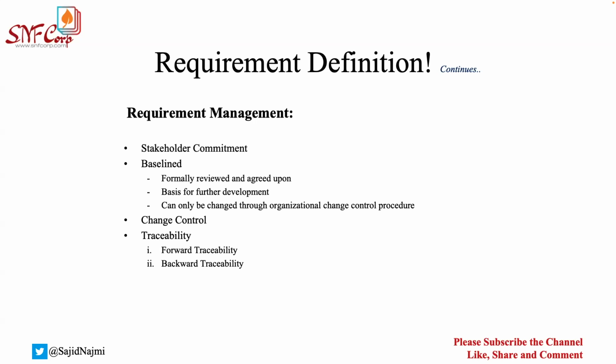So traceability metrics is something a BA creates and uses as their own working sheet. A very important thing to remember: trace metrics is not required by the project. You don't have to upload this trace metrics to the functional requirements section or anywhere in the SRS or BRD or any other documentation. This is purely yours and internal to you. You don't need to share it with the business. Business has nothing to do with your traceability metrics. Business is not going to approve or reject your requirement documentation based on the trace metrics.